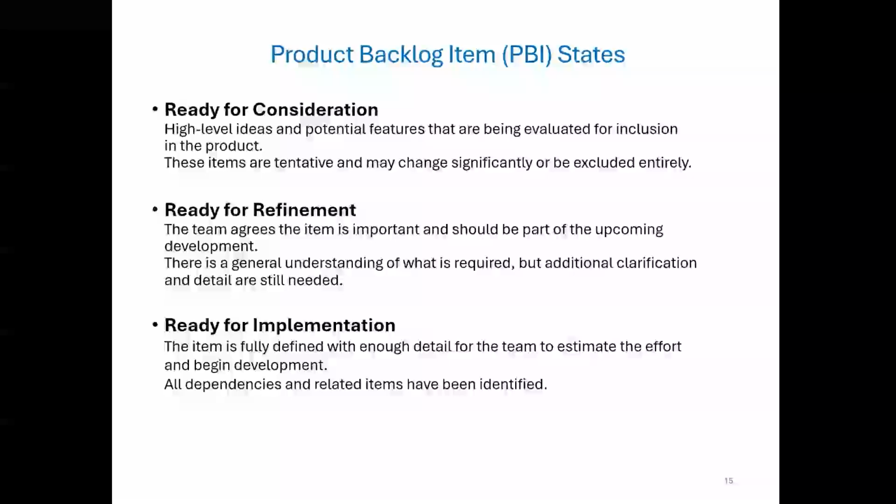Ready for consideration stage. These are early ideas, features or tasks that have been suggested but not yet evaluated in depth. They may represent a product vision or a stakeholder wish, lack details or a clear value, or be excluded later based on team discussion. Think of this as the idea stage, a parking lot where we store possible backlog items until we are ready to evaluate them further.